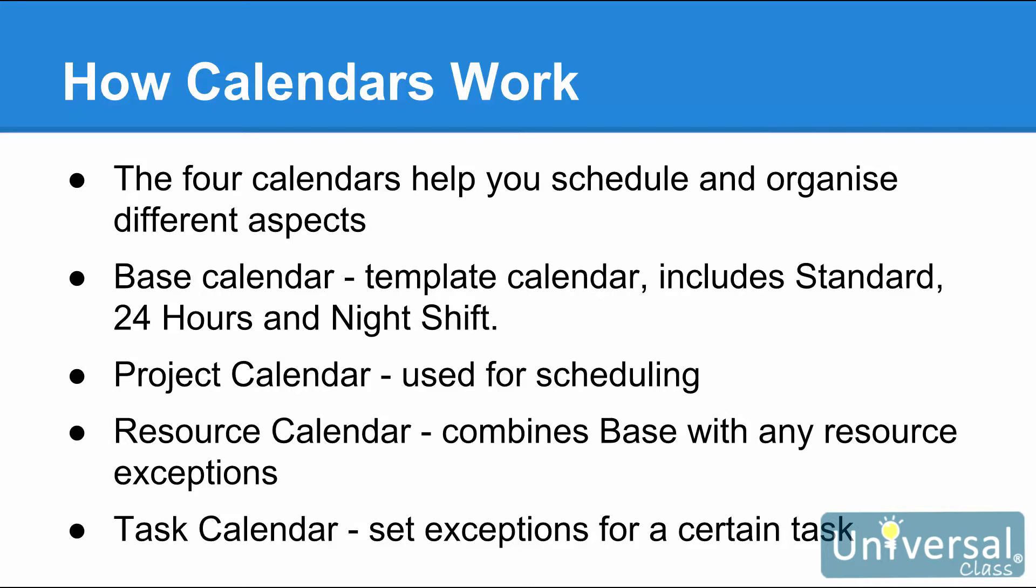Standard reflects a default working day as 8 to 5 with an hour built in for lunch. This is Monday through Friday. 24 hours allows work to go on around the clock every day of the week. The night shift template sets the working times as 11 PM to 8 AM with an hour for dinner and a Monday through Saturday work week.